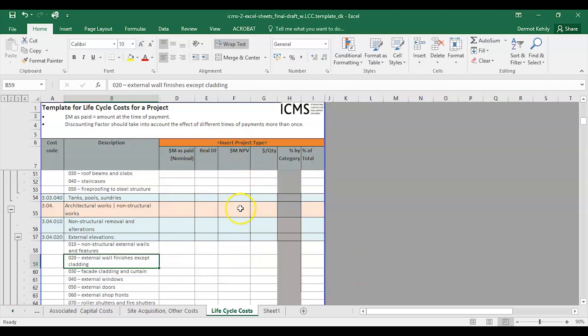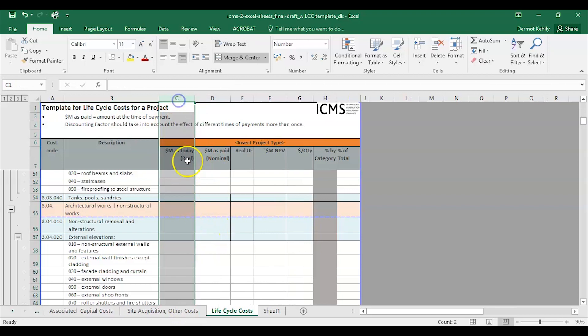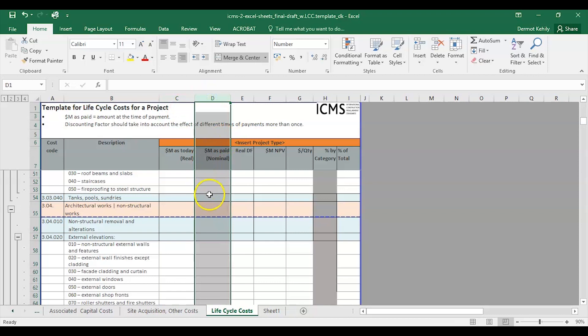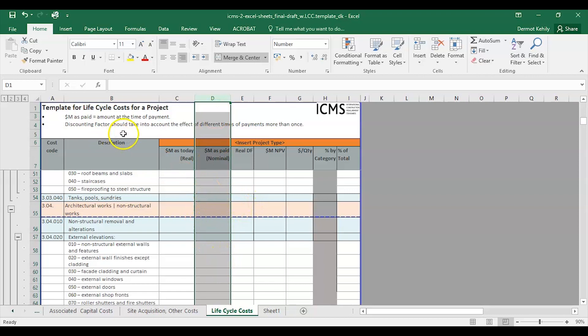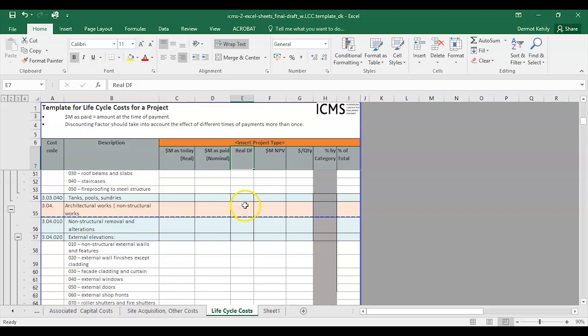I've added a hidden column for real costs, which shows costs in today's money. The next column, from the RICS template, is nominal costs — the future costs of making that payment at a particular period, including inflation over the study period. Then there's a discounting factor; I've added a real discount factor column, because there's a difference between the discount factor with and without inflation. You also have your net present value column.